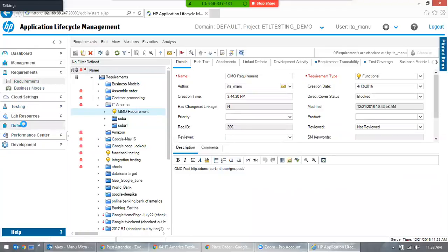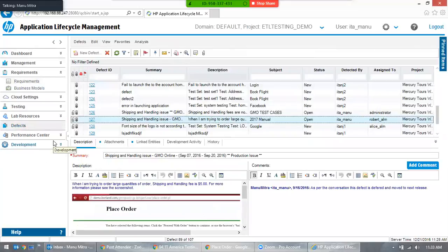Okay, so let's quickly go to reports. This also has reports, the same thing. You can have reports as team level reports or project level reports. Project level reports are about what projects we are working on, what the defects and issues are, how many issues there are, and how many are fixed. All these are project level. Team level is how many people are working on this, how many applications, how many testers there are. So team level is required for the manager, your boss, and project level is required more for the Scrum Master.